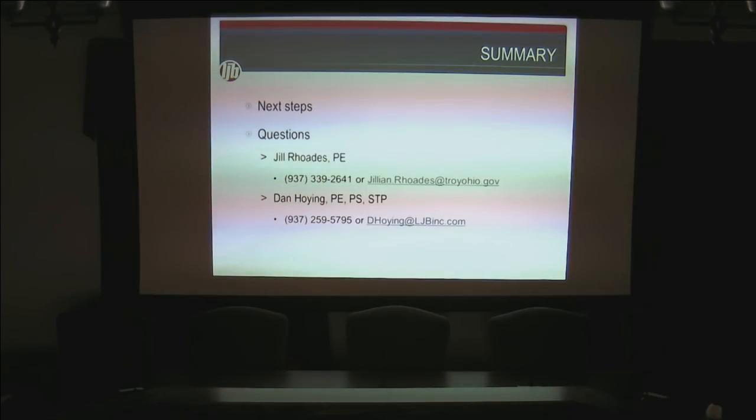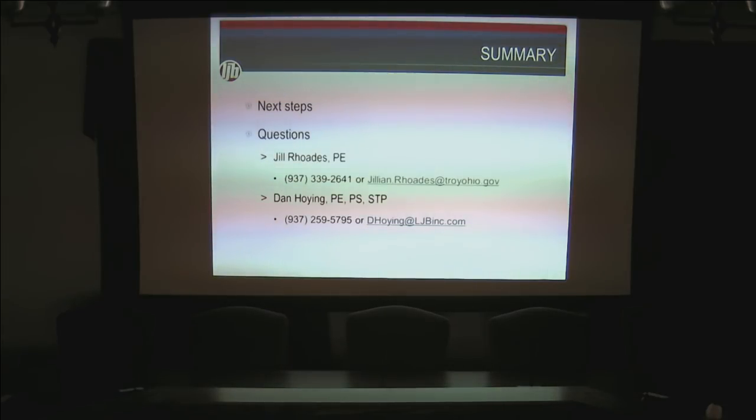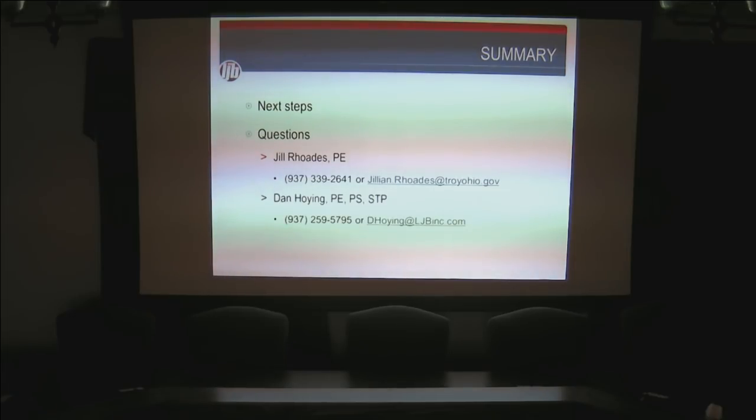We're going to work to finish our next rounds of design and hope to be finished with the design by about the end of March. And then, depending on how that schedule goes, we would go out for construction starting as early as April, May, and want to be mostly under construction while school is closed again, either this year, or wait a little bit longer into the fall and start the construction in late fall this year or early spring next year, and then do most of the construction, particularly in the intersection, during next summer. Because again, we want to make sure that that intersection stays open during the school year and during those school months. So unless we have anything else, that's the information that we had prepared from a presentation standpoint. If anybody has overarching questions, we'd be happy to take those.